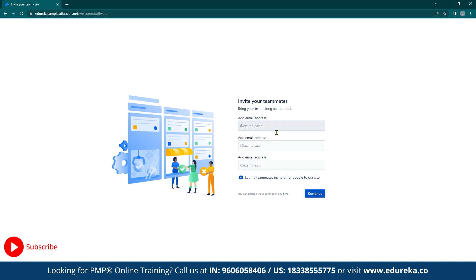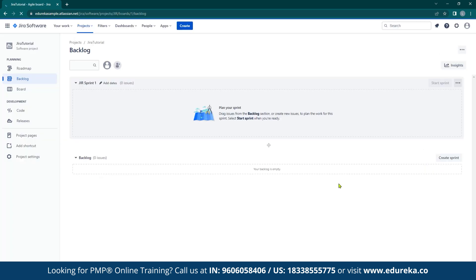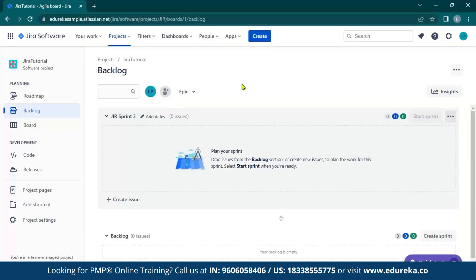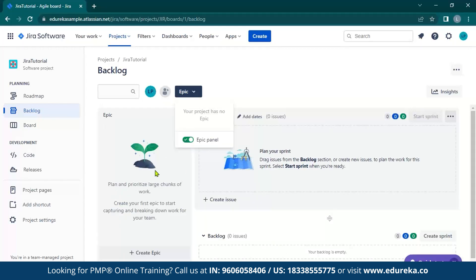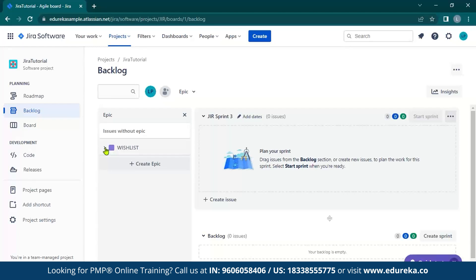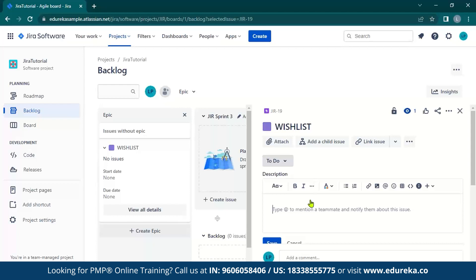We can now invite our teammates. After this, you will be taken to the backlog section of your Jira interface. Let us close the dialog boxes for now. The first thing we need to do is create an epic, so let us enable the epic panel. Over here, you can click create epic and give it a name. For this project, I wanted to use the example of a wishlist where I could store and view my products, so let us name this epic wishlist. Now that we have created the epic, we can use the drop-down menu to view the details, add a description, add comments, and add stories and tasks.